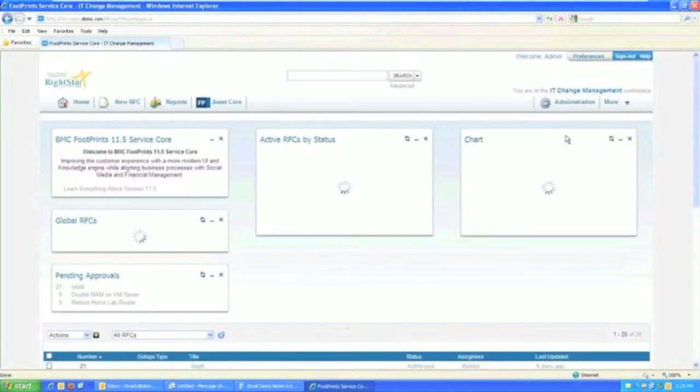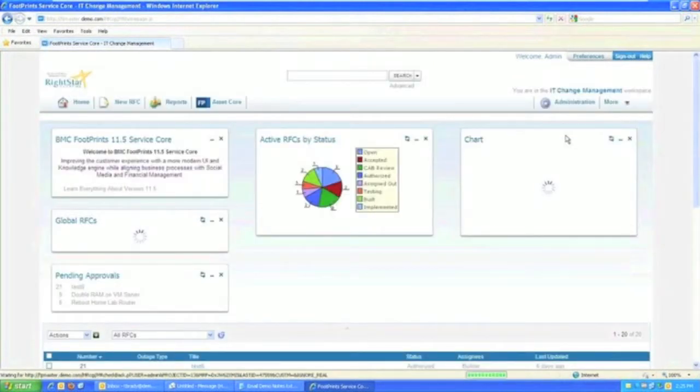So I'm going to apply some type of change, whether it's a patch or I'm installing something, I'm upgrading something. Part of the change manager's job is to find an appropriate time to do it. So I've got to know how dependent people are on that particular, we'll say, server. While this doesn't have a failover server, it's a standalone server, it runs these applications. Therefore, I know I can't take that down during business hours, so let's schedule that change for after hours versus,